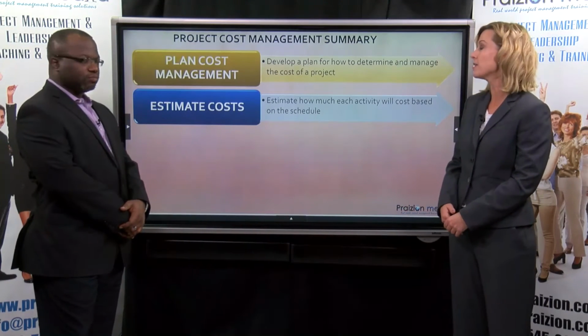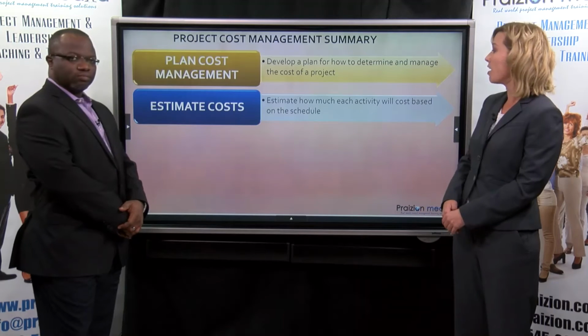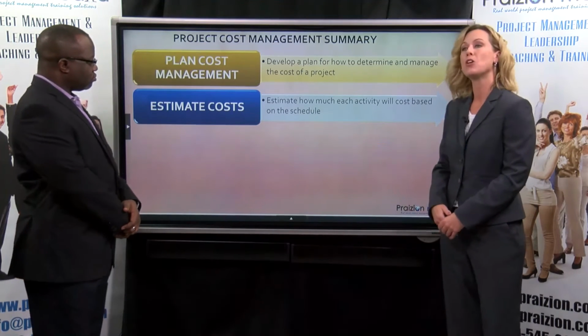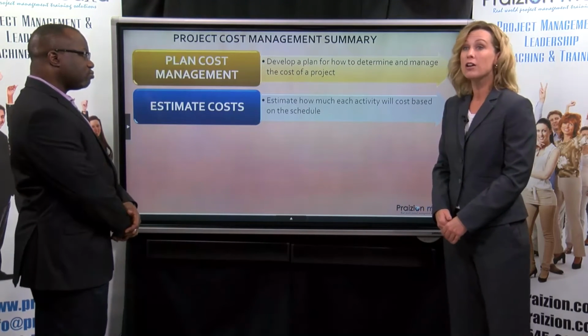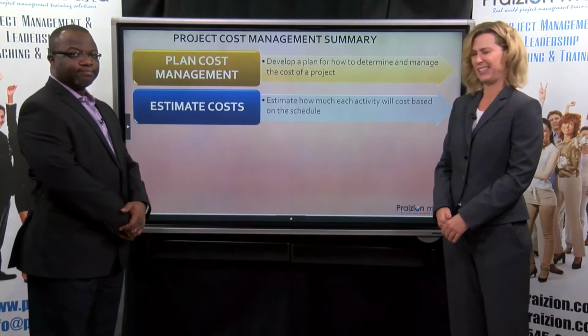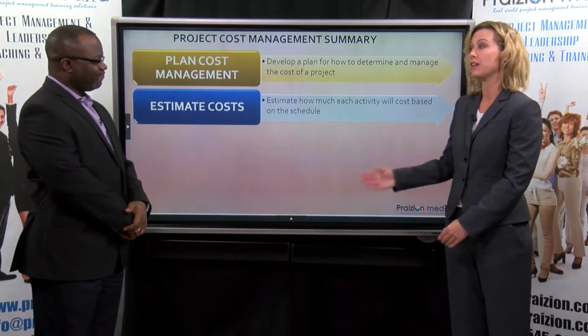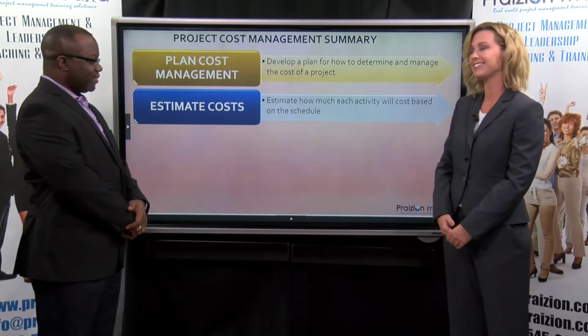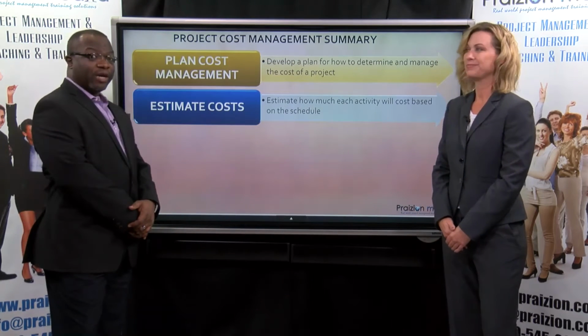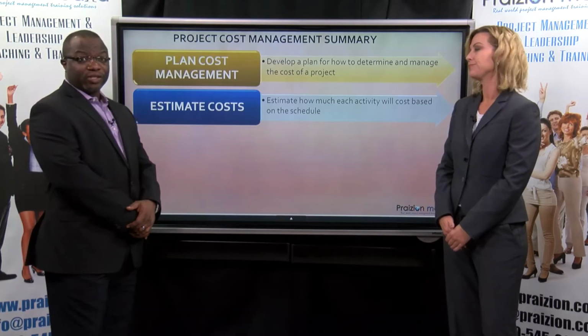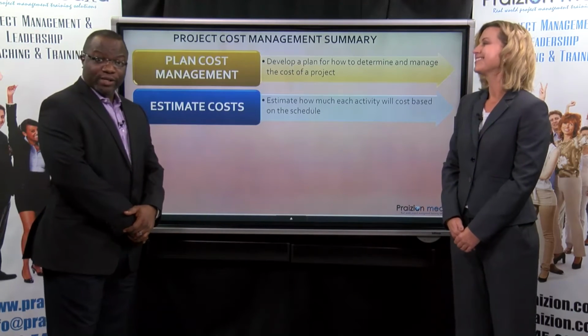All of these elements make up our estimate costs, but we also want to document what the basis of those estimates are so that we can know, was I pretty sure or was I definitely sure? Because that is going to help us ultimately with the next process and the rest of our project. And being as sure as you can be is really going to help you when you look at the big picture of the damage done from your estimates.